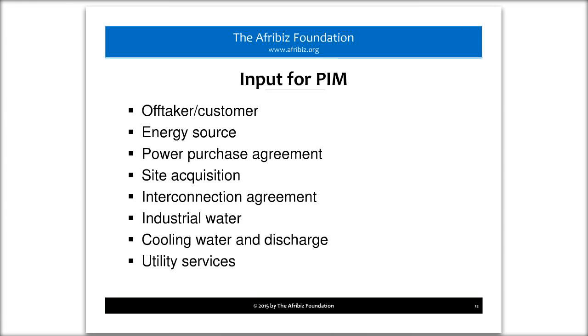And as people are starting to bring projects on from other rounds, Eskom is not actually able to give them definitive information about interconnection. So that means that projects are having trouble getting to financial close. So all of these variables become very important. And again, you want to keep this in mind from the very beginning and track all of these important elements.